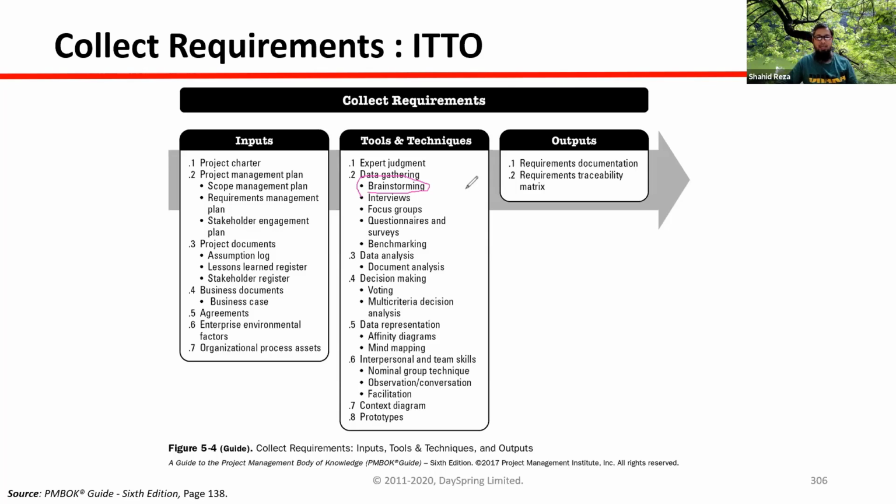So we generate ideas in brainstorming sessions. There is a relation between the brainstorming session and nominal group technique. After the brainstorming session, in nominal group technique, we prioritize the ideas: which is the top priority idea, which is the most appropriate idea, the most important idea.